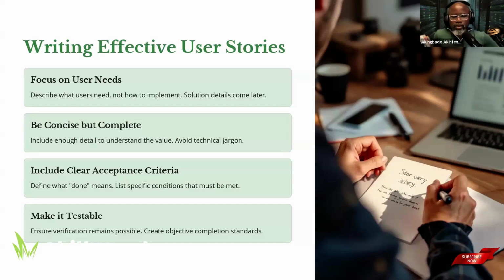Definition of done. So the definition of done is simply saying, okay, what exactly does it mean to be done? That's all. It's important we know that to eliminate confusion, because we want to make sure done to us means the user story has been accepted, we've tested it, and everybody feels good about it. Maybe that's the definition of done, but that should be spelled out, because we need to know what we consider done in the project as a whole.